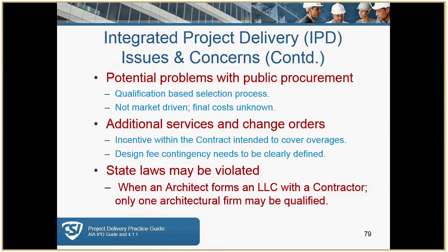Keep in mind there's not a lot of case law with integrated project delivery, so that's why professional liability insurance can be problematic. However, in discussing this with insurance carriers, they really like the idea that you're all signing one contract, and they really like the idea that you can't sue each other unless there's blatant, flagrant fault associated with what you're doing.